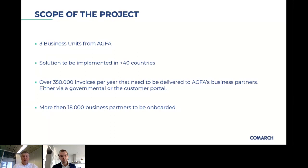The lesson we learned is clearly that we need to inform customers upfront, to ensure the majority are onboarded prior to the actual go-live, so you have a smoother launch rather than going live and onboarding simultaneously, which creates a vicious circle. The COVID crisis also didn't help, as many customers now have other priorities than clicking a link to access a portal.